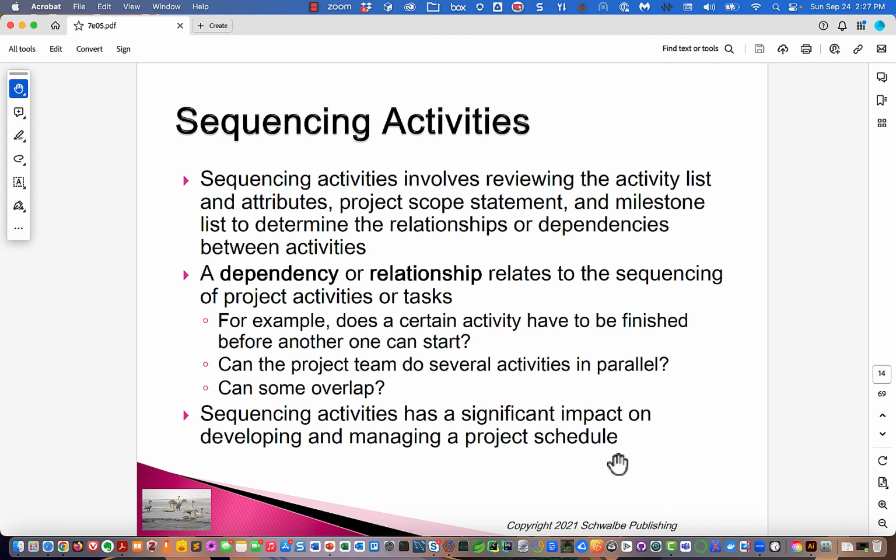Most project planning tools, and again, the one that I've used the most is Microsoft Project, allow you to later go back and define the resources that each activity takes and what your pool of resources are. And then they have a process where the schedule will be stretched out such that you don't violate any of your resource constraints. It never makes the schedule go faster. It always makes it go slower.